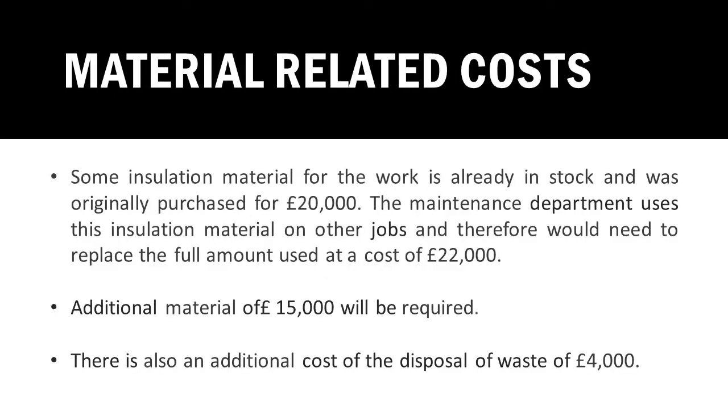Some insulation material is already in stock and was originally purchased for 20,000. This 20,000 is a cost in the past. It's already been purchased. It's past tense. So this gives us the clue that this 20,000 is not relevant because it's in the past. So it's a sunk cost.